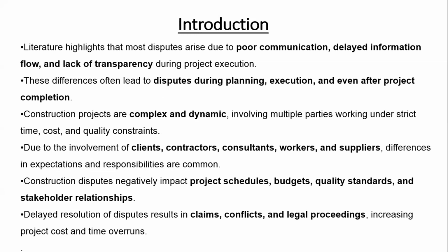So the literature highlights that most disputes arise due to poor communication, delayed information flow, and lack of transparency. These differences often lead to disputes during planning, execution, and even after project completion. Construction projects are complex and dynamic, hence involving multiple parties working under strict time, cost, and quality constraints. Due to the involvement of clients, contractors, consultants, workers, and suppliers, differences in expectations and responsibilities are very common.